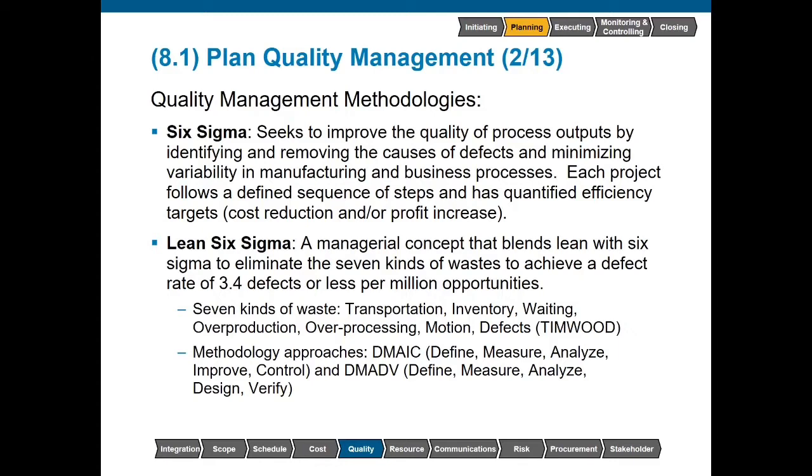When we discuss waiting as a type of waste, this refers to practitioners that are being paid but are not producing anything of value. Perhaps they're waiting for somebody upstream to complete their work so that way they can go ahead and do their piece. If we visualize this along a production line, we can see how a choke point can cause several people to be waiting for any type of work to reach them. Overproduction simply means that we are producing more than the customer is willing to buy, accept, or consume.